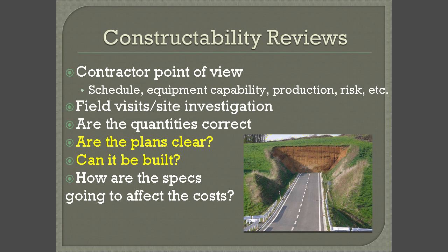We're not going to go into how they take advantage of it, but they do. There is a possibility of overrun and underrun. If an item is going to underrun, you don't want to put your money in it, because you're going to lose your money. Put it in the item that is going to overrun. They also look at whether it can really be built the way it was designed.